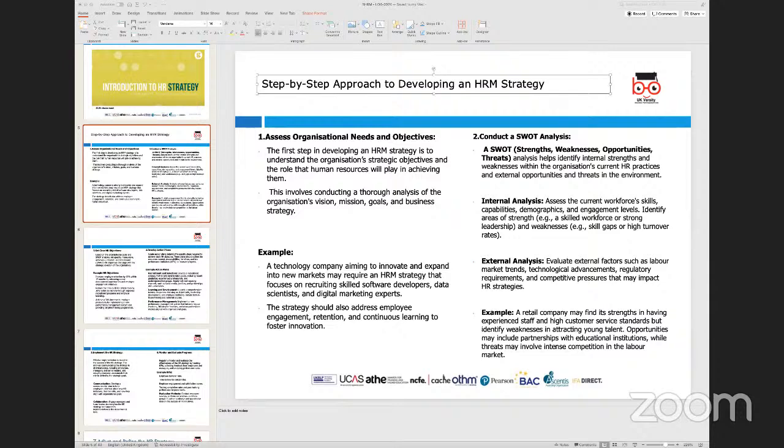Now, readjustments can be done because, if it is an example that I gave at the start, we are looking at expanding or opening 10 new outlets for the business. If the economic environment is in a downturn or there's a slowdown in the markets, then you might want to scale down some of the expansion plans, and that would be adjusting it, refining it basis the market conditions that you find.